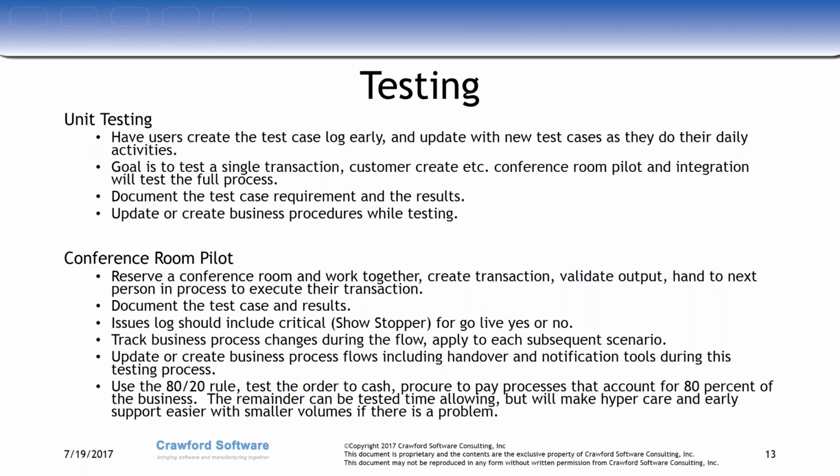So we'll help you identify the new functionality and things you want to do, or you're noting them in the business process flow review or in the conference room pilot, but try to move them to a stage 2 or a phase 2 of the project, unless, say, there's a new tab on the part system that lets you enter inside diameters, outside diameters, things like that, and you were keeping them in Excel before. That's a pretty harmless one. Go ahead and implement that, and you can judge those as you go forward.